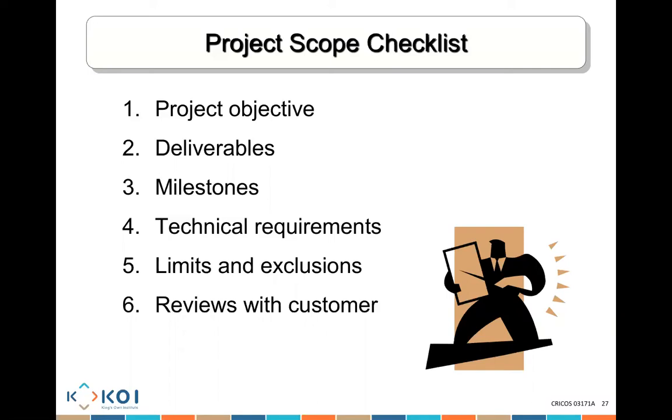Another deliverable could be section 2 of the module. When you deliver all 10 sections of that module, you have a milestone, which is an important achievement in your project that does not actually consume time. So the milestone could be, we finished all the 10 modules and they're ready to go. A deliverable could be, I finished one module, it's done, it's ready to go. That's one deliverable that is completed.